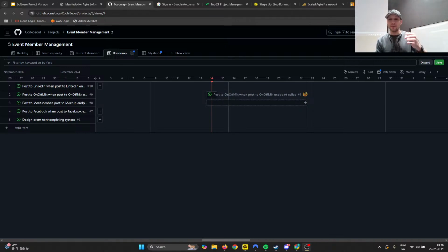So the comment was, it might even be better for the PM to not have technical experience. Now, I have experienced this because I'm a PM that was also an engineer. And there are times where I'm like, they said an 8, but that really sounds like a 4, right? In the past, when I was first doing this, I would ask, you sure you can't do it in 4? No, a PM should not do that. A PM should almost always argue for more time than less, or figure out a way to break things down into smaller increments and then move stuff around if you need to. So that is another thing of that PM that I had who was non-technical but very good.